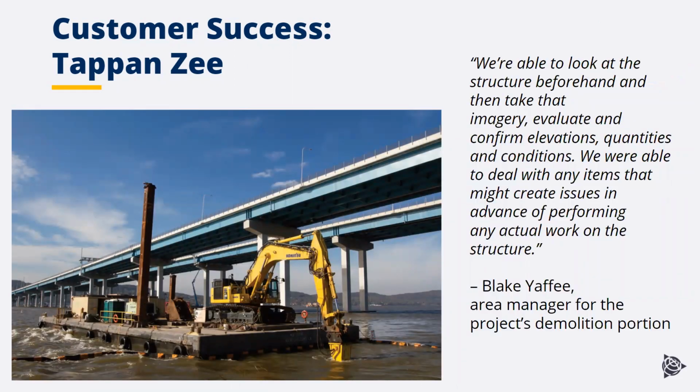And this, I believe, is my last slide. I'll close with a quote from Blake Yaffe, who was an area manager for the project's demolition portion. He says, we're able to look at the structure beforehand and then take that imagery, evaluate and confirm elevations, quantities, and conditions. We were able to deal with any items that might create issues in advance of performing any actual work on the structure. So again, overall, we're talking about efficiency here, and just having that information, knowing that information, you're removing the guessing from traditional methods. So this project would have taken much longer had they not been using this type of technology. And this project team has indicated that knowing what they know now, moving forward, they don't see a situation where they would deploy machines for this type of an operation without the use of this technology.